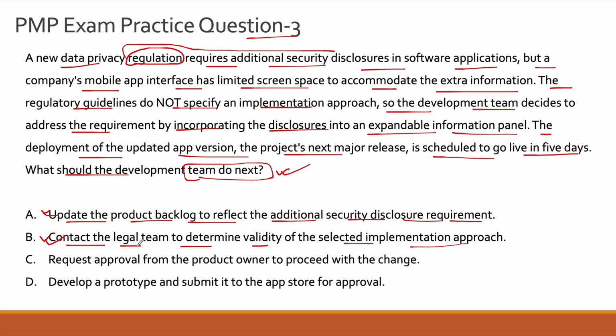And the reason for that is if you link this back to the RACI matrix, which is the responsible, accountable, contributor and information part of a communication channel, you should know that the A, or the approver, the entity with whom the accountability lies of this regulatory requirement, is not you, but your legal or your cybersecurity or your regulation or privacy compliance team. So they have to be okay with the solution you are proposing. Because if you go ahead and implement something, tomorrow they might come back and say, look, whatever you have done is great, but this does not match our requirement and you need to go back to the drawing board and redo the entire thing, right?